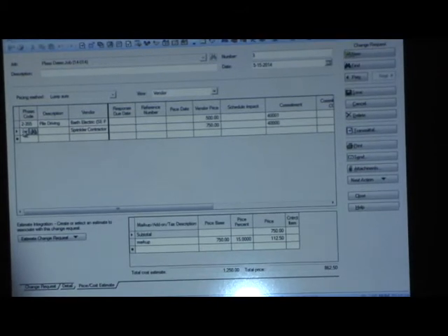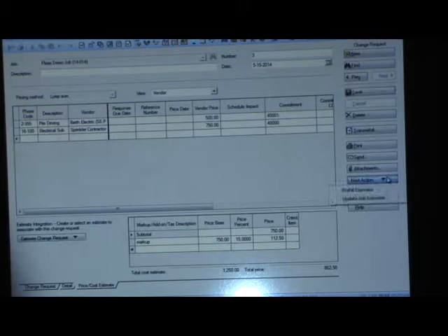So this is what we would do for an internal change order, or if it's work that we're proceeding with even though we don't have the owner change order yet. So we can manually say, I want to issue the cost side as an approved estimate change right now, even though I haven't entered the owner change order yet. So we always want to do that when it's internal because we're never going to get an owner change order for our internal stuff.